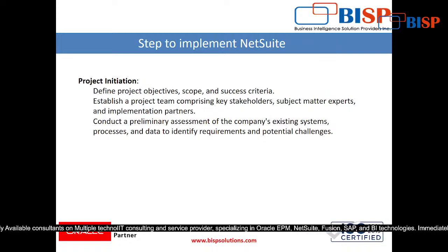First of all, project initiation. Define project objectives, scope and success criteria. What the objectives are, and what scope means: what we are going to provide and what we are not going to provide, should be directly written in the BRD. Establish a project team comprising key stakeholders, subject matter experts and the implementation partner.